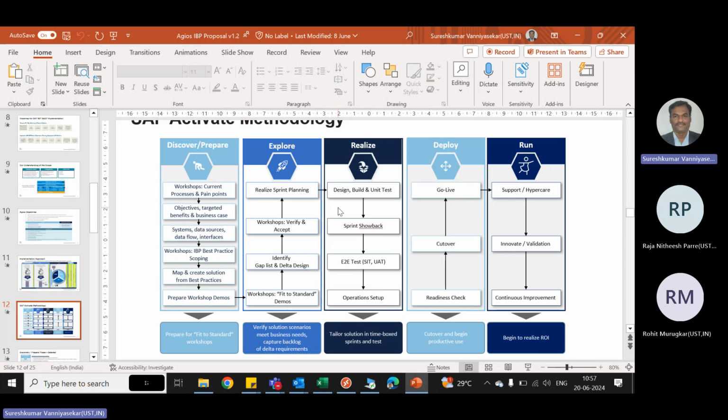In phase 3, you can tell them we can run the forecast and show how the forecast would be. Then in sprint 4 we will have the complete UAT. Then the fourth milestone will be the actual go live and the cutover activities. After that, one month is the hypercare support.